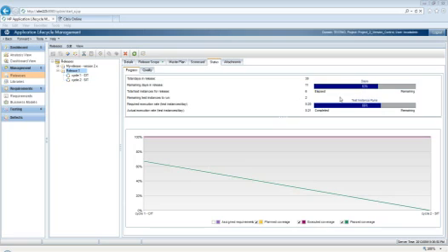So in here, this view is actually very used, and the project manager will always be looking at this. If these numbers coincide, the number of days with the progress in total here, then you're on the right track. If they don't coincide, and if your number of days is almost completed and your run percentage is very low, you know you're in trouble, you know you are going to miss your deadline, and so on and so forth. Also, if you have big differences in here between the number of tests and the number of passed tests, which is on the graph not showing very neatly now because I have very few requirements and test cases, then you'll also be